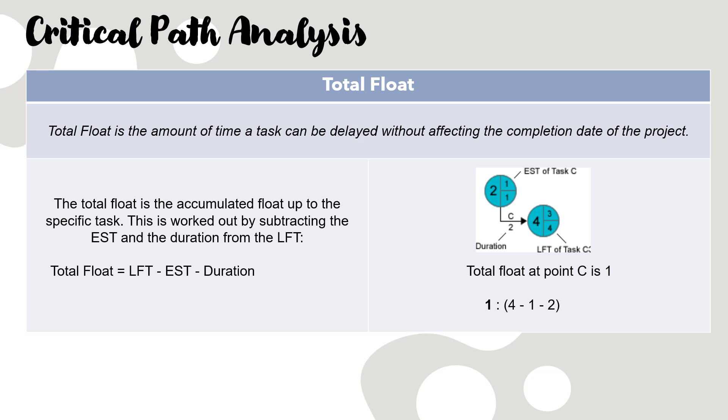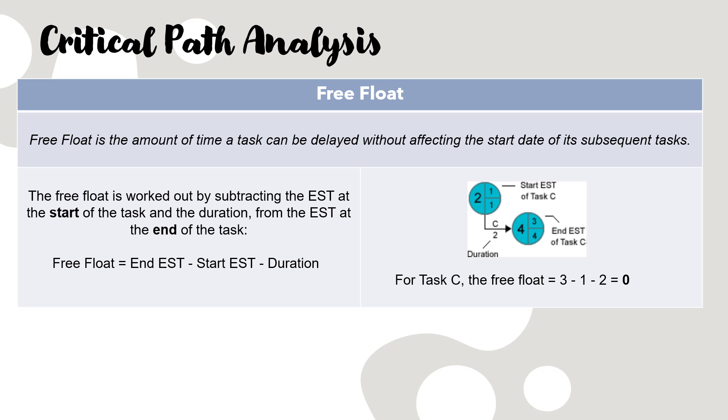You will also be expected to calculate float. There are two separate types of float: total float and free float. You need to know the definition of both and how to calculate them. Total float is the amount of time a task can be delayed without affecting the completion date of the project. It's the cumulative float up to a specific task, and there's the formula. Take a look at it - fairly simple arithmetic, but you need to be able to calculate that, know what it is. Free float - same idea. The only difference with free float is it's the time a task can be delayed without affecting the start date of the subsequent task, the next task, and a slightly different calculation. Make sure you can calculate free float and total float.